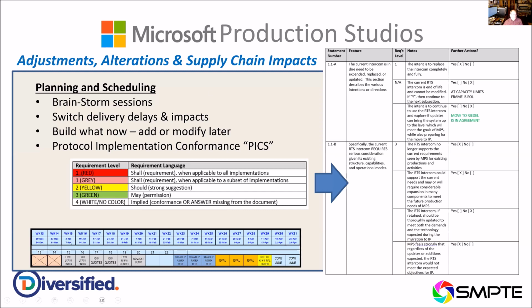And then we laid out, rather than a complex Gantt chart that you might have expected, some very simple things based upon weeks and dates and so forth. And this has to do with when we were picking out and evaluating the broadcast controller. We'd send out RFP quotes. We'd come back and evaluate the RFP and the quote costs. Then we'd request a demo. We'd have to wait for the demo. Then we'd stand up a small network. Then we'd evaluate them, make a final selection from the RFP, and then continue on down the work. So we literally did this kind of layout for every section of the facility, and there were multiple sets of these spreadsheets created.